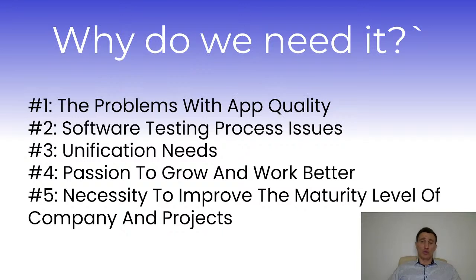So I introduced processing like handover, where I put developer and QA together, and developer during 10-15 minutes showed the QA what was done in this feature, and this is working. So this process was fixed, and QA saved a lot of time for this investigation.